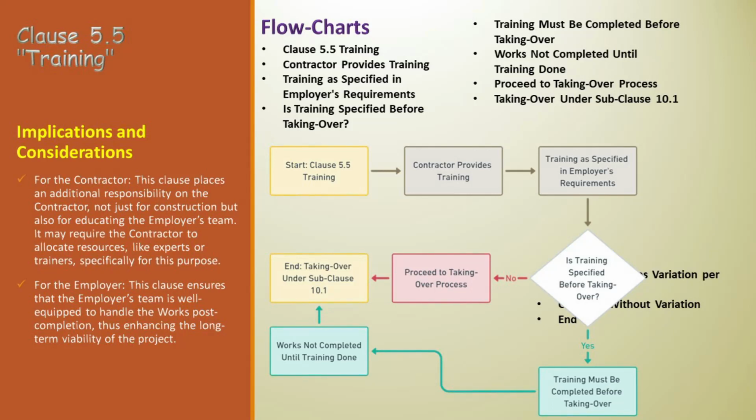If the contract specifies that training is required before taking over, then the training sessions must be carried out and completed before the works can be considered ready for handover. Next is works not completed until training done. The works will not be considered as completed for the purposes of taking over until the specified training has been fully carried out. Next is proceed to taking over process.